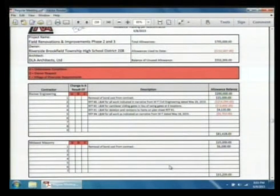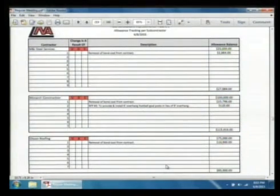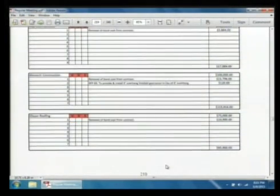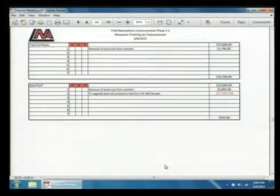And then we go to page 2. Everything else, I believe, are credits with the exception of Austin Electric. That was a short credit, and I'll get more documentation from Joe on that. And then we had to upgrade the turf on the last page, which was $17,000. That's manufactured in the warehouse and also provides us with the additional 2 years of warranty. So overall, we're about $152,000 into our change allowance budget, which was $705,000.